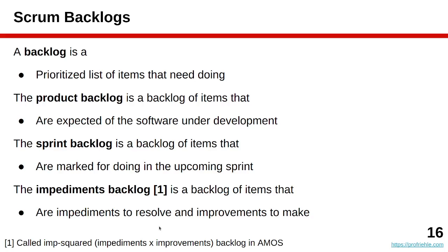And the product backlog contains all the items known to the product owner at the time. It's separate from the sprint backlog, which is that small subset of the product backlog that, for a given sprint, the software development team agreed upon and committed itself to do during the upcoming sprint. So it's a small part of the product backlog. The sprint backlog is usually finite. It needs to fit into one sprint, while the product backlog is always growing, at least for product development, but even for projects where not necessarily everything that's in the product backlog will actually get done during the project.